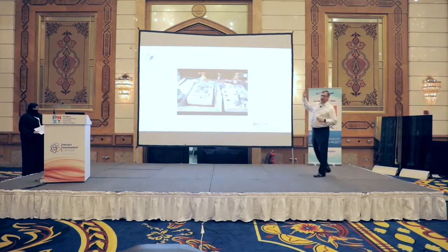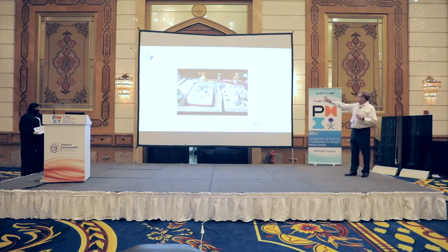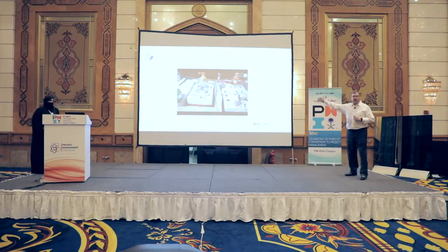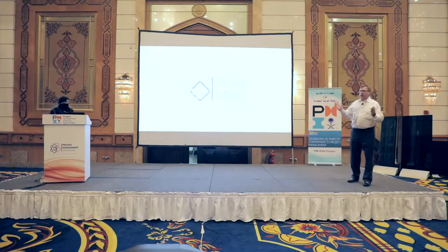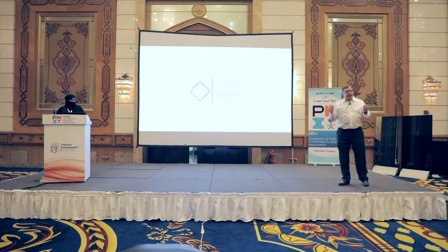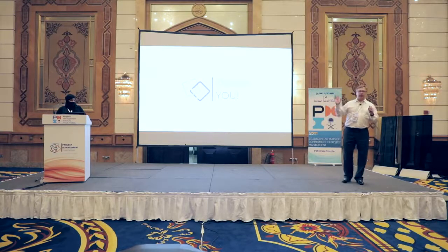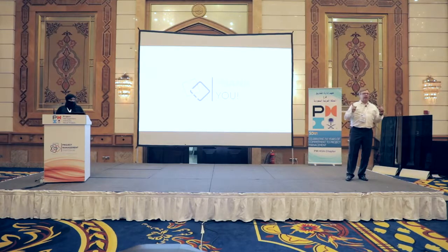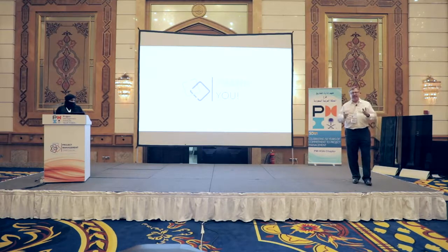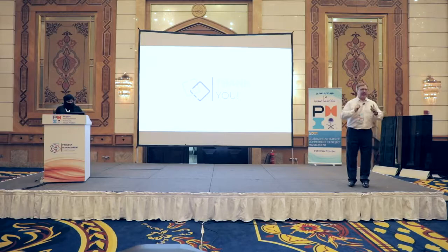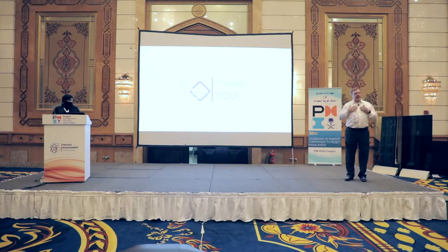And of course, no vessel replacement is complete without a cake with a vessel on top of it. So I'm happy to say to date that 10 of the 16 vessels have been replaced. And I'm also very happy to say that each of these replacements has completed its project 7 to 5 days ahead of the planned schedule. It saves about 25% of the time during the shutdown. Now, I'd like to take the credit for the 4D modeling for that, but I'm sure there's a lot of other factors, but I'm sure the 4D had something to do with it.